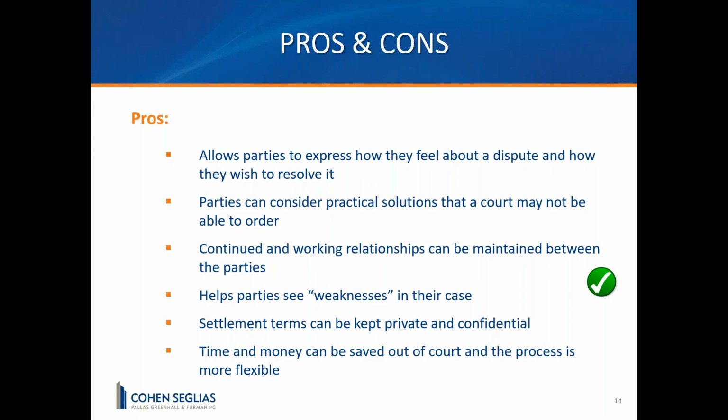It also helps continued working relationships to be maintained. Oftentimes disputes arise between parties that do work together over and over again. And so you don't want to burn your bridges. And so mediation helps you to keep those relationships solid. It also helps parties to see weaknesses in their case. The settlement terms are kept private and confidential, the time and money can be saved out of court, and the process is certainly a lot more flexible than some of the other processes available.